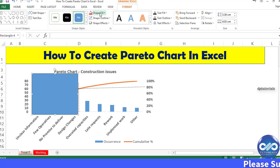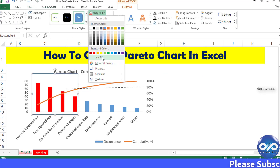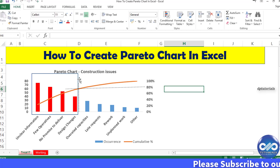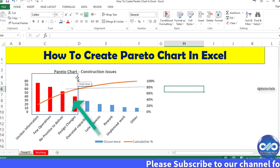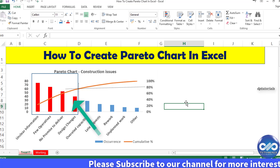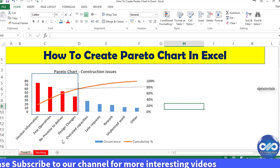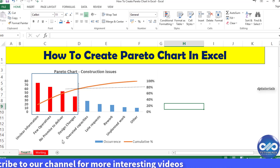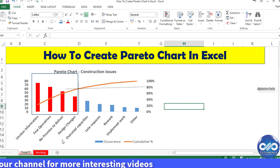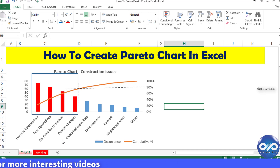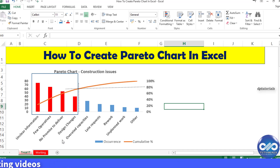This is widely used in project management to prioritize work — that is, 80% of your problems can be solved with only 20% of efforts and concentration. Now let's get into the working file and see how we can create this Pareto chart in Excel for our further analysis.